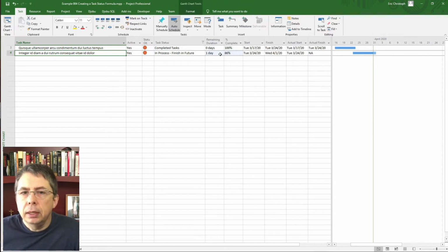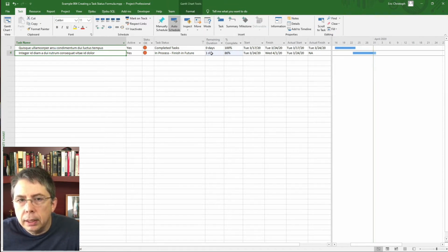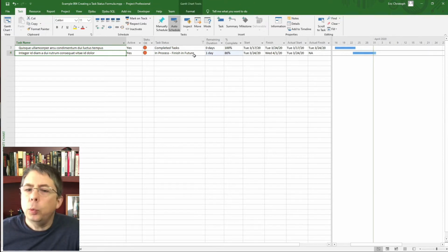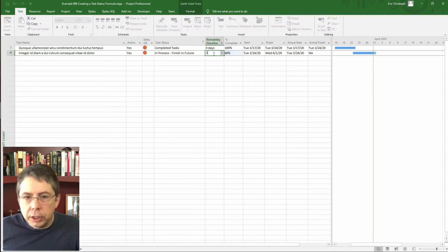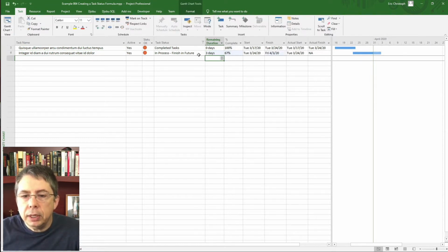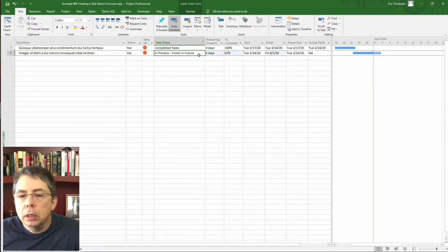And you say, so in my meeting with the project manager 30 minutes from now, I'm going to be able to tell him that you said this task is going to be done in 1 day. And that tech lead's going to come back to you and say, you know what, you better give me a couple more days. So we change the remaining duration to 3. And you say, that sounds smart.